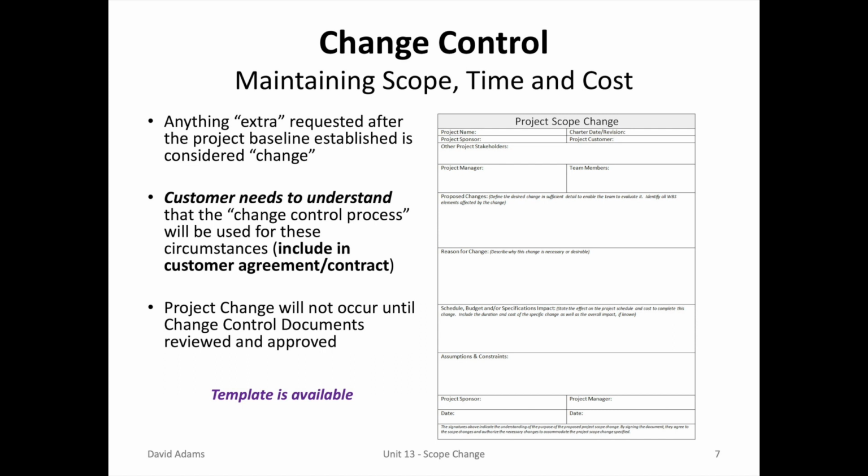When the project team reviews the scope change, if it's technically possible and the customer agrees to a push out of the time schedule and/or additional cost, then the project change can happen. Another golden rule: get a signature, not just a handshake.